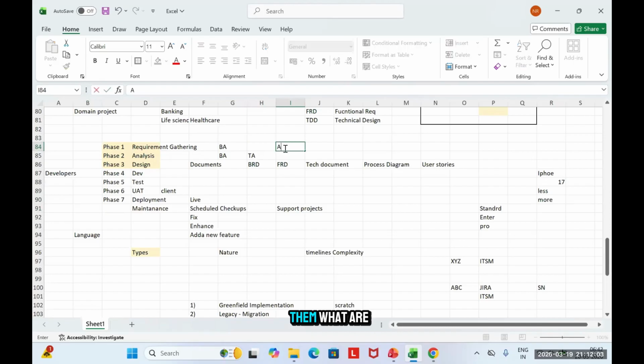First, I'll ask them what their pain points are, what their as-is process is, and what their objectives are. Can you share what you have already? What is it that you are already using? So I'll have a lot of sources of requirements. After those requirements have been captured, I want to analyze. Maybe I'll do a gap analysis: what is the difference between what they have today and what they are expecting tomorrow, and what could be the impact if I bring these changes?